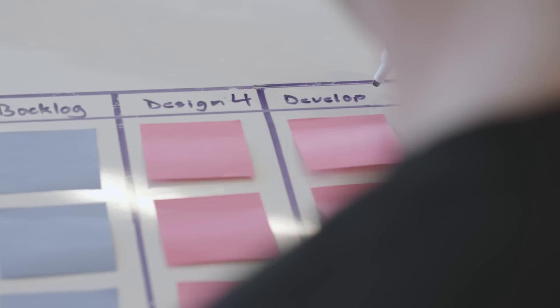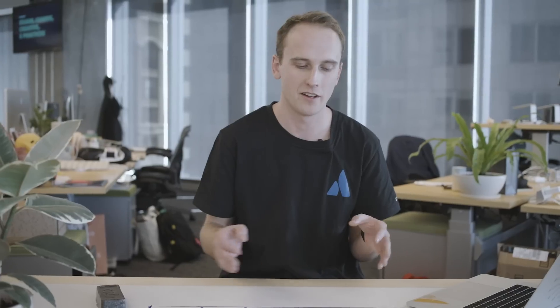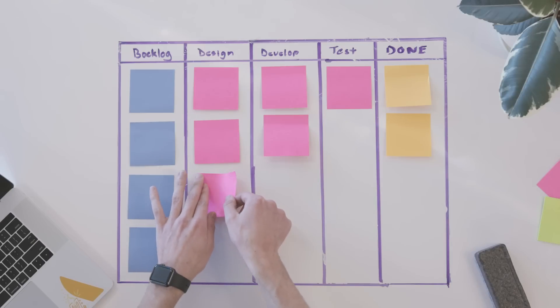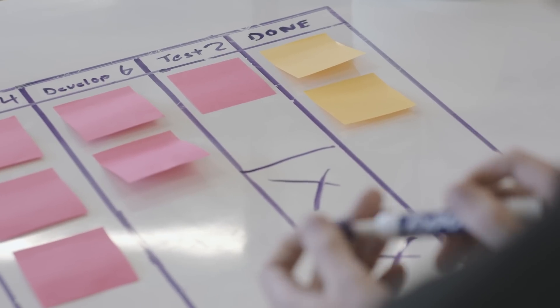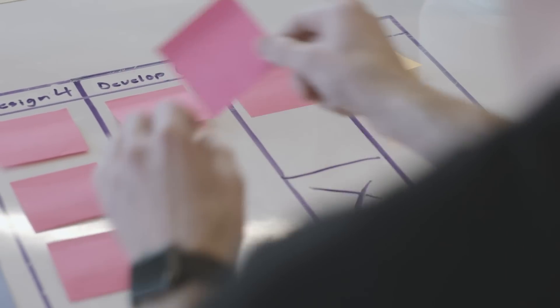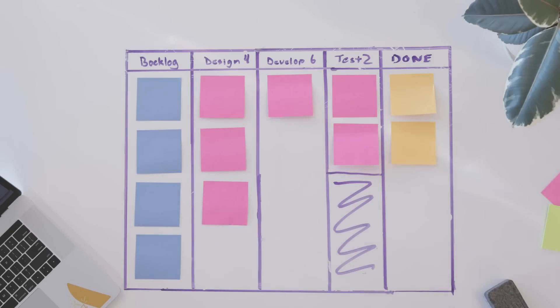The simplest Kanban boards are physical boards where teams divide their workflow into vertical columns. They take a white board or black board and mark up the board, filling each column with sticky notes. The sticky notes then flow through the workflow to demonstrate progress. The first advantage of a physical board is it's super easy to set up. The second reason that I love physical boards is they're so tangible and fun. Kanban helps you visualize your work, and there's something about this colored sticky note and moving it from one column to the other that is so motivating and easy to engage with. If you're starting to visualize your work, you might as well start with a physical board.